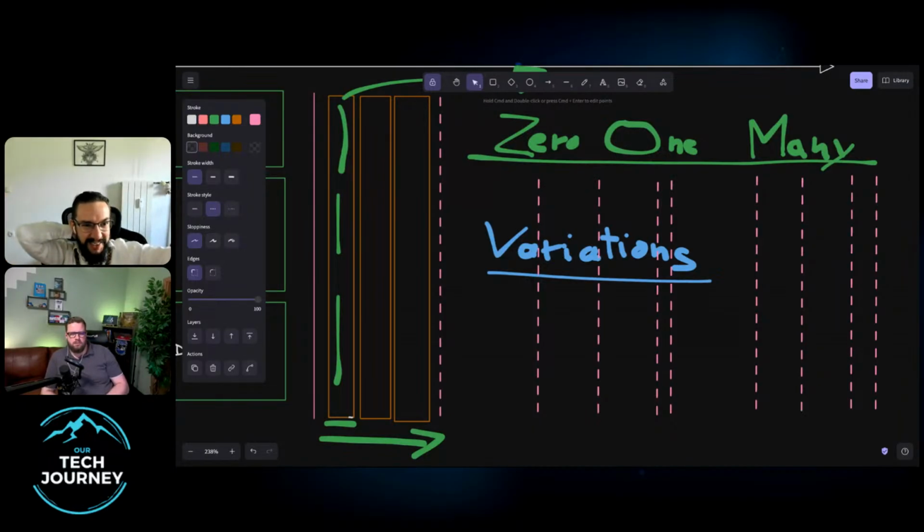Usually if you're doing backend to front end, then what happens is that you run out of time to do front end changes or to pimp the design, or you're so focused on the front end that you then run out of time to do backend changes. So usually whoever is at the end of the cycle, or imagine I add another layer which is just testing. If it's at the end of the cycle, then you will do basically no testing, because whatever feedback is derived from testing or QA, you won't have time to act on it, right? Because you will have changed your mind by then about what it is you really want from QA. QA might tell you it was a bad idea to build this, let's start from scratch. And by that time, you won't have the appetite to do so.